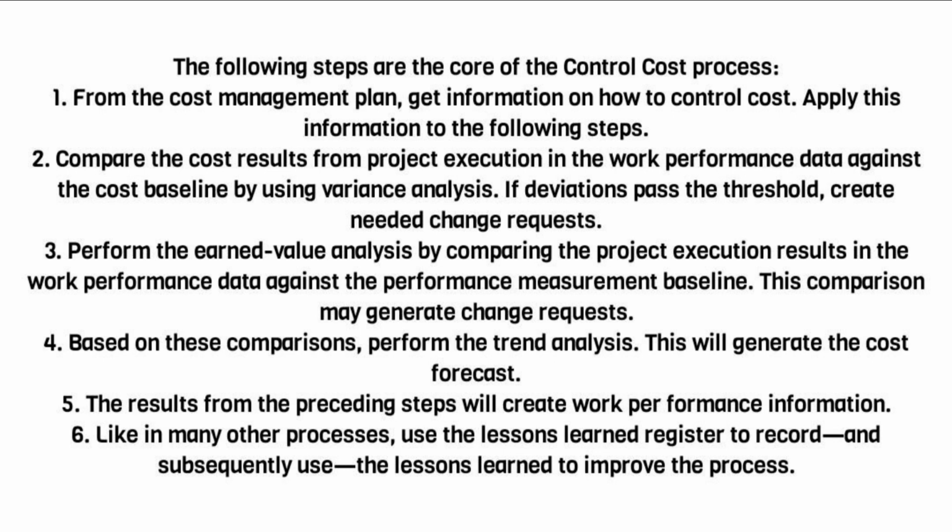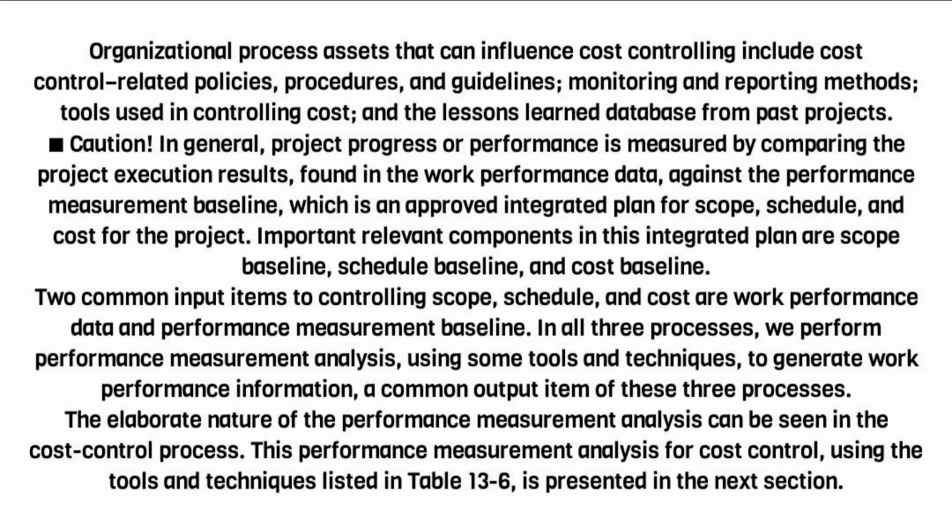4. Based on these comparisons, perform the trend analysis. This will generate the cost forecast. 5. The results from the preceding steps will create work performance information. 6. Like in many other processes, use the lessons learned register to record and subsequently use the lessons learned to improve the process. Organizational process assets that can influence cost controlling include cost control-related policies, procedures, and guidelines, monitoring and reporting methods, tools used in controlling cost, and the lessons learned database from past projects.